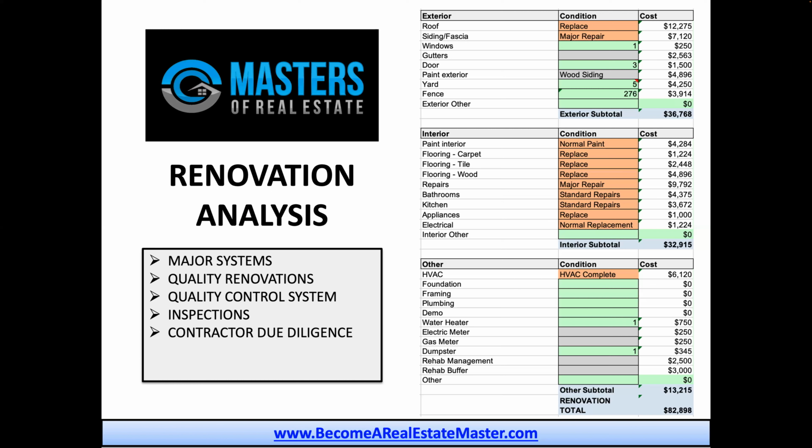Subcontractors as well, and they're properly licensed and they're pulling all the permits. Get copies of your permits, because a contractor will lie to you and tell you they did a permit when they didn't. So these are the things that are important on the contracts and the insurance piece with regard to this. And they have to have the right general liability insurance. They have to have workers' comp insurance, all of those types of things. And you want to get lien releases as they make payments to their subcontractors so that you don't end up with a lien on your property.